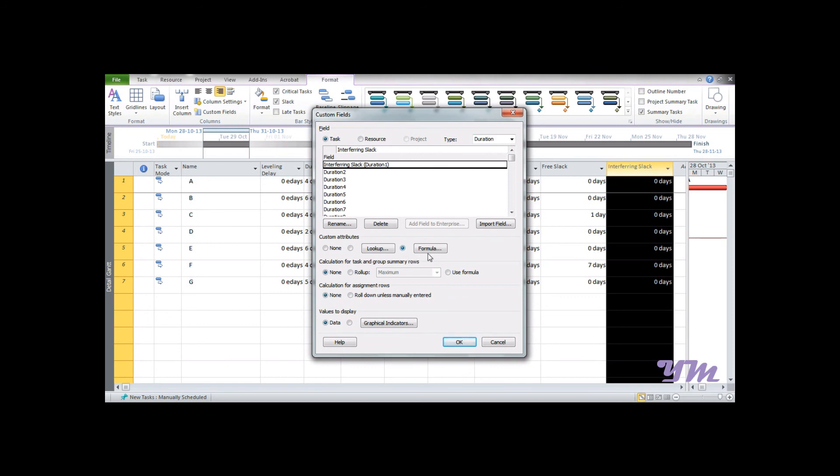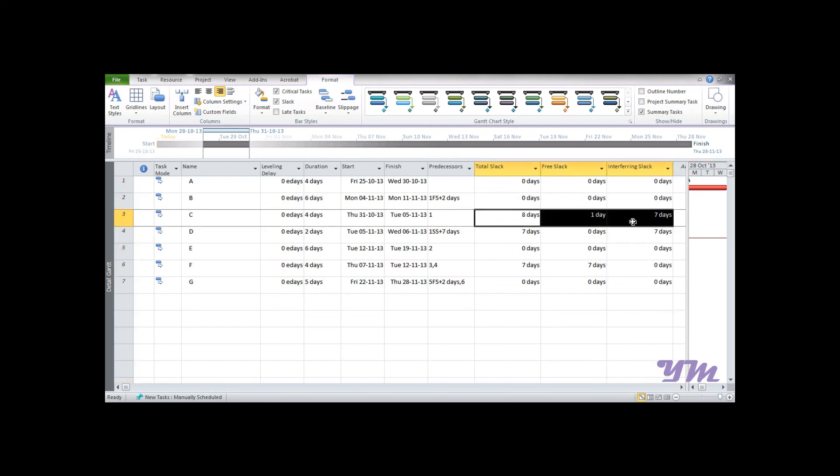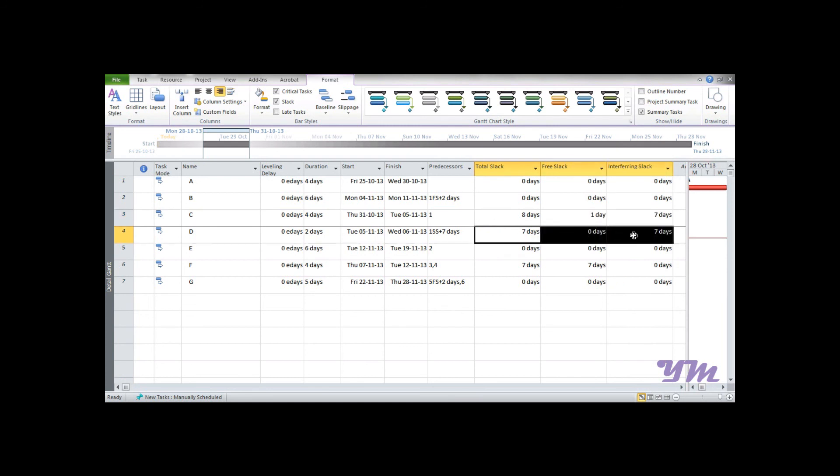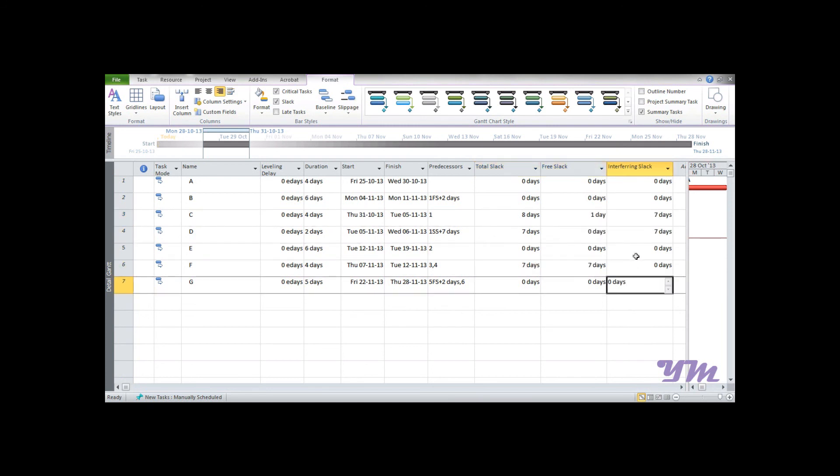OK, OK. Make sure that you have selected this bubble over here and you have entered the formula, and press OK. You can see it's done: 0 minus 0 is 0, 8 minus 1 is 7, 7 minus 0 is 7, 7 minus 7 is 0. This is how we can use the formulas.